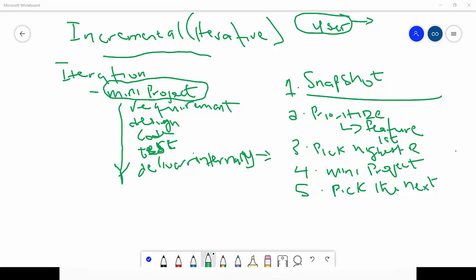Because these are things that happen. These are not just conjectures. I'm not just guessing these questions. These are real life questions that you will face when you are working on a project, right? You get your estimation wrong, you put more features into an iteration, and that iteration ends up going longer than you expect, pushing the whole project timeline forward. All right? What if there is an unexpected delay? Something just happens that delays the process, right? Well, that might look like you won't make your iteration deadline.